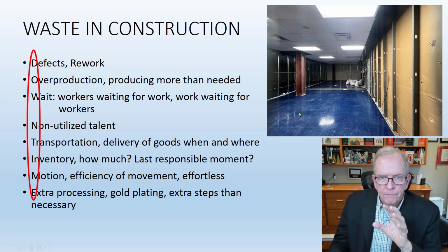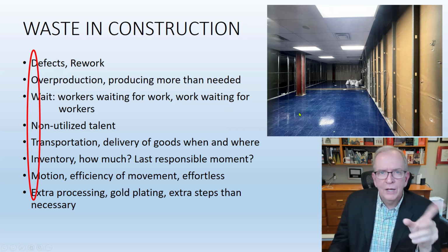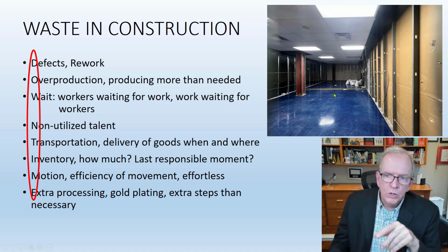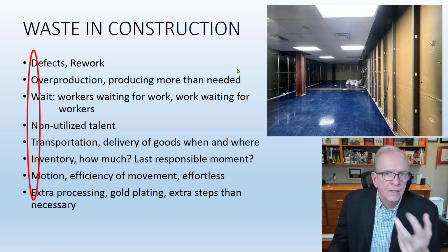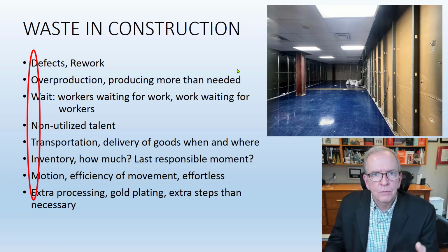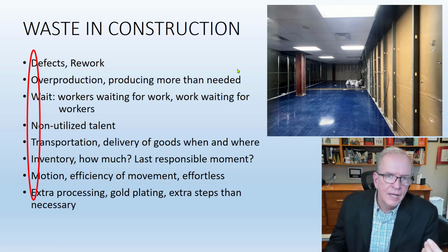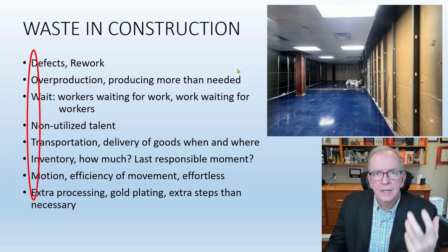But from a project point of view, what else is being integrated here? Where are you storing this? You're storing it in another room? Is that a room where the HVAC is getting roughed in? Is that a room where the plumbing is getting roughed in? And then they can't do it, so they have to move everything, and then you have to move it again. That is a big, big cost. And every time you're moving something, did something get lost? Did something get damaged? Did something get stolen?